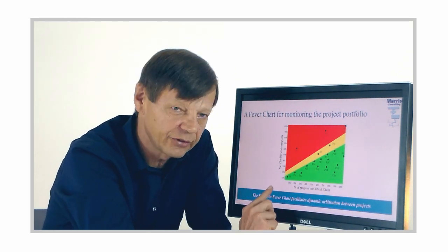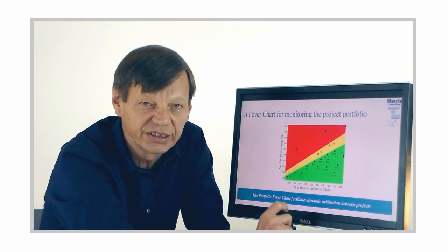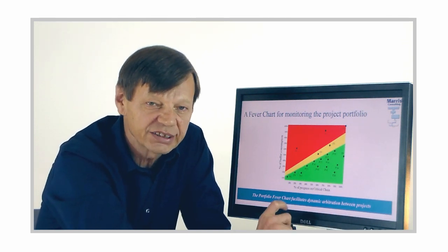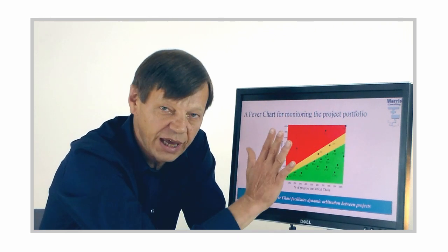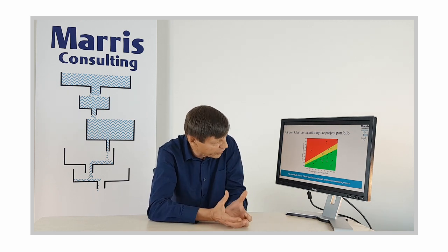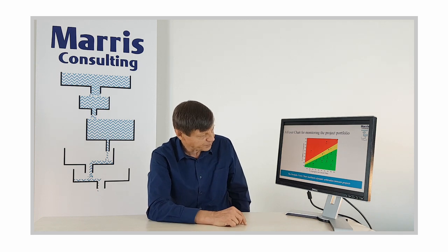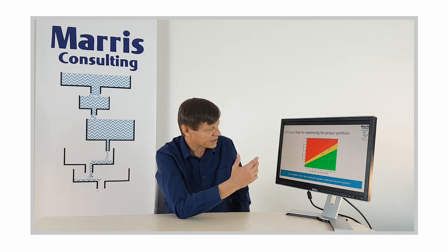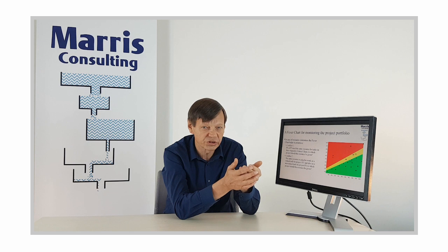In the same way, on the other axis, it's a percentage of the buffer, and therefore you can put projects that haven't got much variability and therefore don't have huge buffers. And you can put next to them a project which, for various reasons, has a lot of uncertainties and has a very big buffer. But it's all in percentages, so you can put everything on the same page, or at least you need to put everything that's going through the same resources and the same part of the portfolio on the same page. And that's the system. And the beauty of it is that it will allow you to dynamically arbitrate the priorities of all your resources for them, so that they can decide on what project to work on.